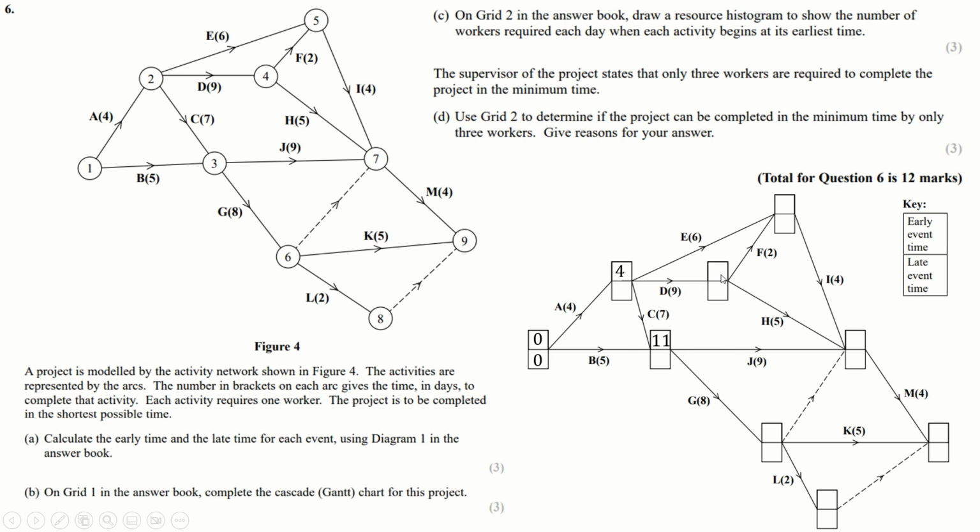So 4 plus 9 gets us to 13, and then here is 13 plus 2 bigger, or 4 plus 6, so we'll go for a 15. And then down here, which is biggest: 15 plus 4, 13 plus 5, or 11 plus 9? I think 11 plus 9 is, because I actually did this one first, because 11 plus 8 is 19, and then plus 0 is still smaller than the 11 plus 9 of 20. And then down here, the only way to get there is with a 21.